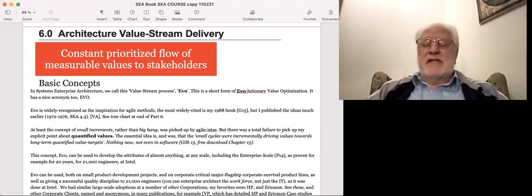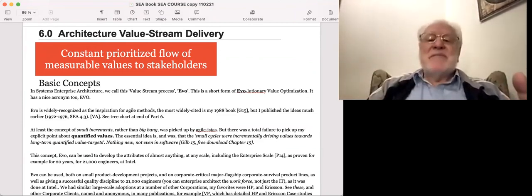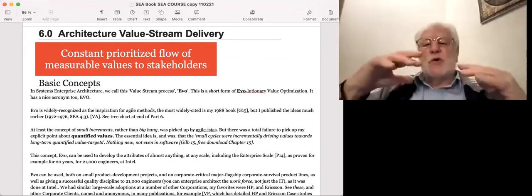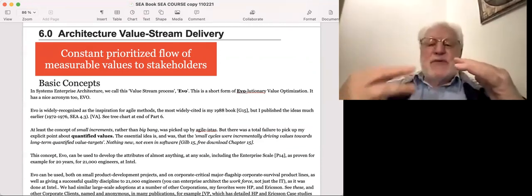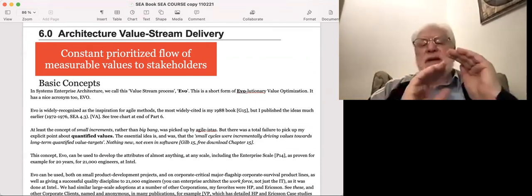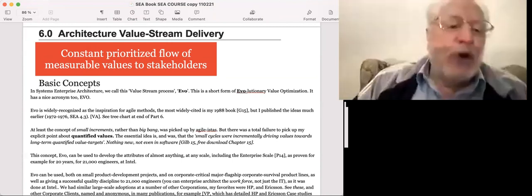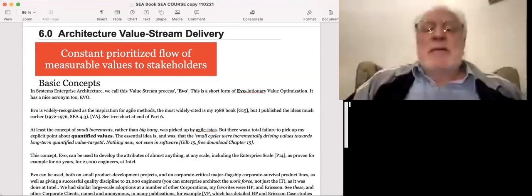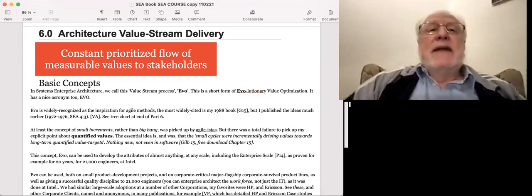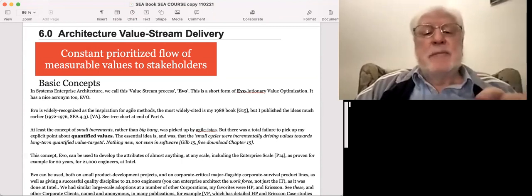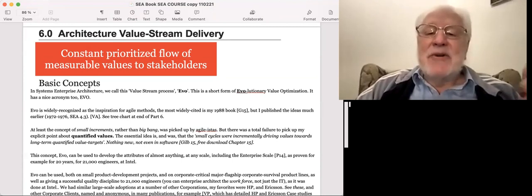the principle of what you're saying is correct. The faster, and if you have a week, you can't use 3 weeks to measure. Now, in fact, there is something like a parallel shadow week of testing, which gives feedback. So they don't literally do everything and then do complete testing in the week. I think all forms of testing generally took a week. But they did say to me at one point that the testing should be designed or architected and simplified so it never took more than half an hour per week.